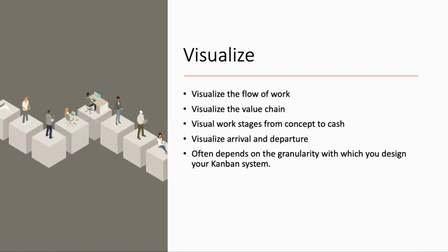Like we'll do the coding, we might do the code review, maybe unit testing, and then we'll move it to test. Now there could be various types of testing. We'll do sanity testing, functional testing, performance testing, regression testing, or you may simply call it testing. Then you'll have validation and verification done by your business. Then you might have validation and verification done by your users.